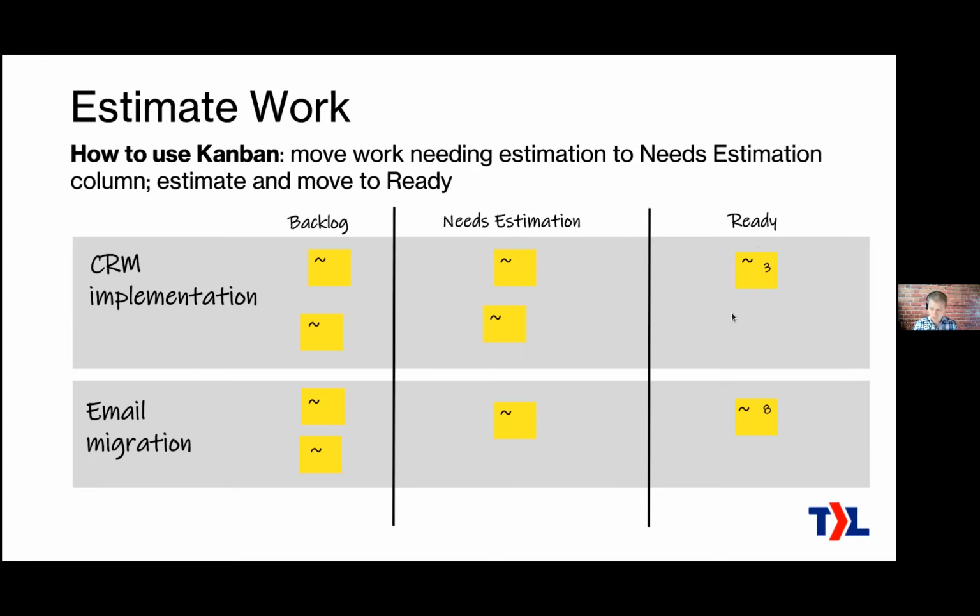Within that, you don't necessarily rank. You don't have to worry about ranking them too much when they're here, because we're going to rank that in the next stage. The next stage is assigning the work to the engineers. This is the trigger to actually make this work get done: you put it into some particular engineer's queue.